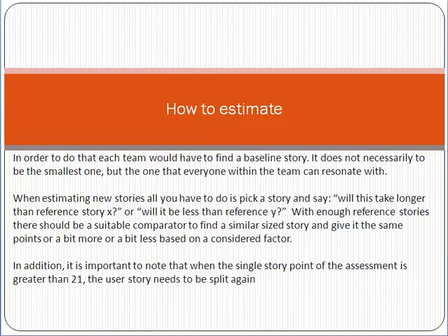So friend, this is the main concept of story points. Again, remember that a story point is not the estimated man-days, it is the difficulty level based on the comparison with a reference story.